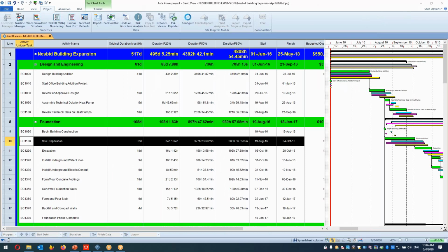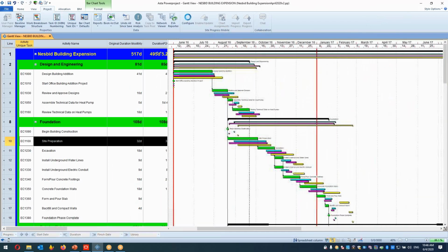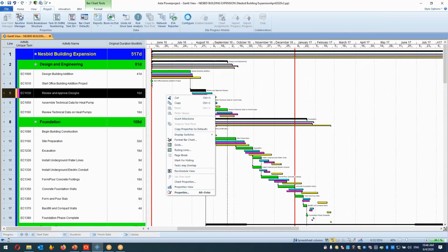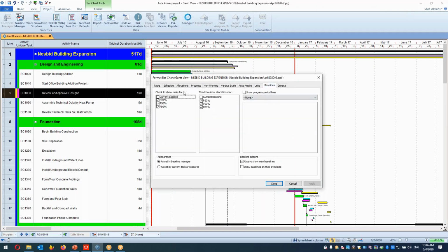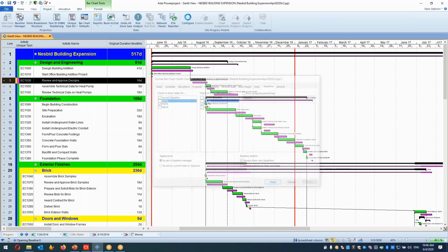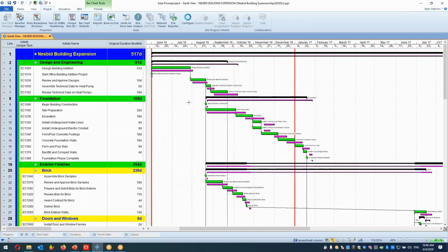By the way, from the baseline manager, you can also select and go to baseline manager, and from the baseline you can change, okay, which baseline is a master program. You can replace the baseline program with the current one. So that you can say, I don't want to see the 80 and 20 by 50. I want to compare it. And in this case, system will be also hiding the others, okay? So you don't have to display all of them. So you can say that, okay, this will be my second options.